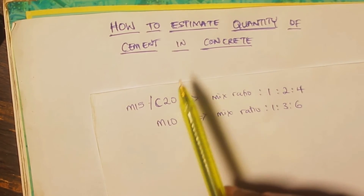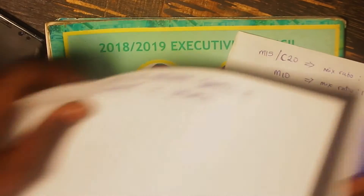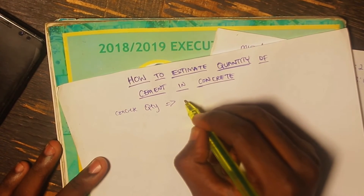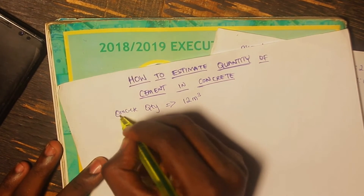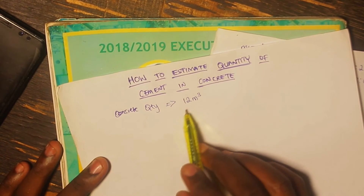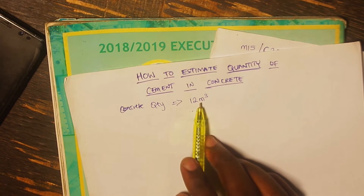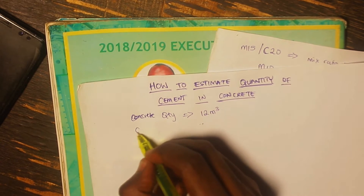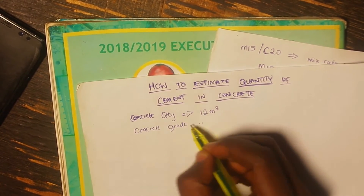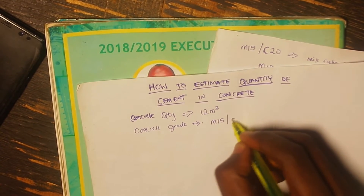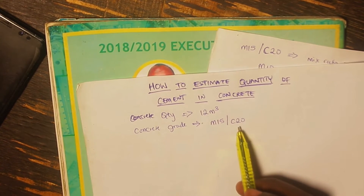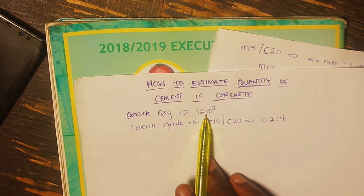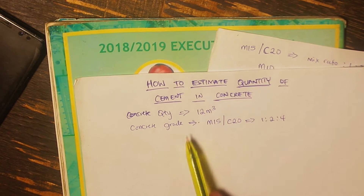That is the first step you need to take in carrying out your calculation. Let's assume that when I look at my bill of quantities, the quantity of concrete is 12 cubic meters — that is the concrete quantity stated in the bill of quantities. What we want to know is the quantity of cement that can be used to carry out the concrete casting for 12 cubic meters of concrete. In this case, the concrete grade is M15. M15 and C20 have the same mix ratio, and their mix ratio is 1:2:4. I know the quantity stated in my bill of quantities and I know my concrete grade as 1:2:4.